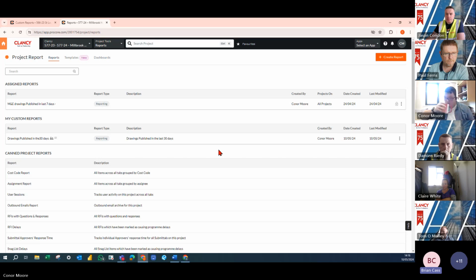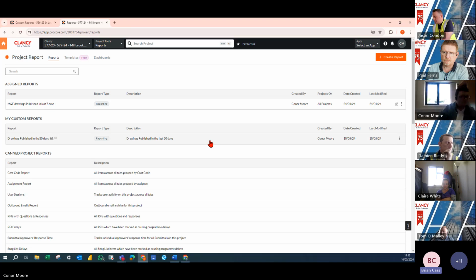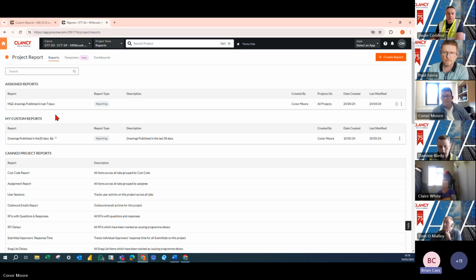Especially with drawings, because if you put people on a subscription for drawings, they can get spammed with emails for a lot of drawings that are not relevant to them. So, for instance, you can see their M&E drawings published in the last 7 days. John Durham uses that a lot, because John is on every job and just gets notified if there are any changes in drawings or commercial activities for drawings. He gets that email once a week for every job. But yeah, very good presentation.